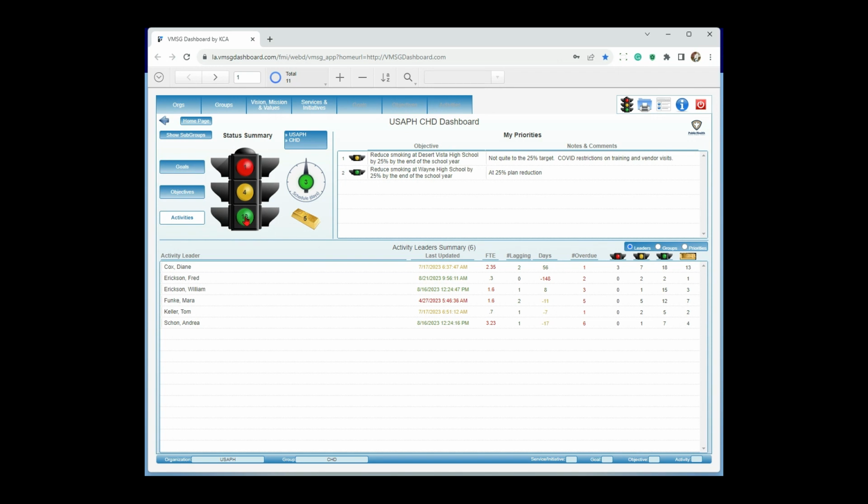If you have everything that's green and gold, and your green up here being ahead of schedule, all is good. Now, when this thing gets down to slightly behind schedule, it turns yellow. 60 days behind schedule, it turns red. So just by looking at green, and again, ideally you want everything to be green and gold, and you're on track here. Down at the bottom, we have a couple of different drill downs.